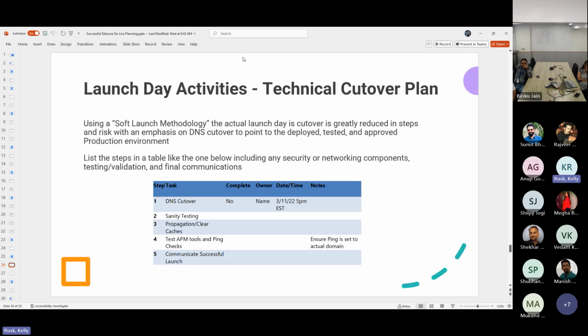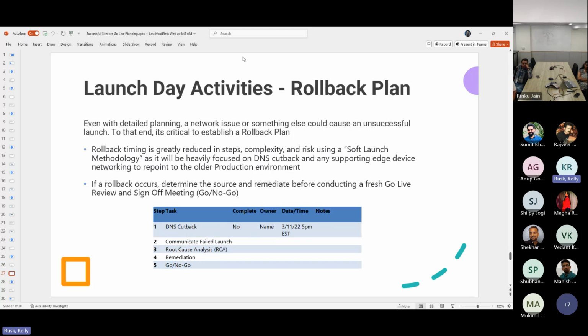Before it even goes up, you're doing a countdown. That countdown is not having everyone doing last minute checks. The rocket's been there for hopefully a couple of weeks and already tested in a lot of ways. That countdown is making sure the ignition goes, that you're ready to launch it into space. And when you think about this, don't forget about a rollback plan. Because once you start letting traffic in, nothing will break a site faster than one user. You always find that one user who clicks on the one thing you did not plan on. And to that end, have a rollback plan.